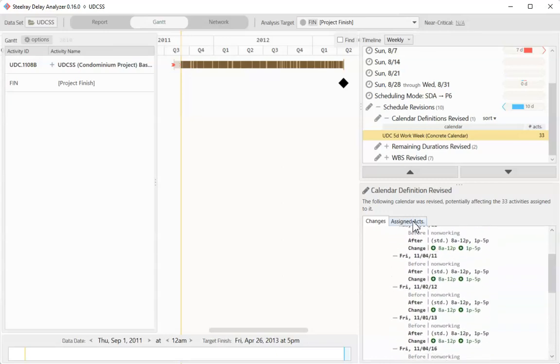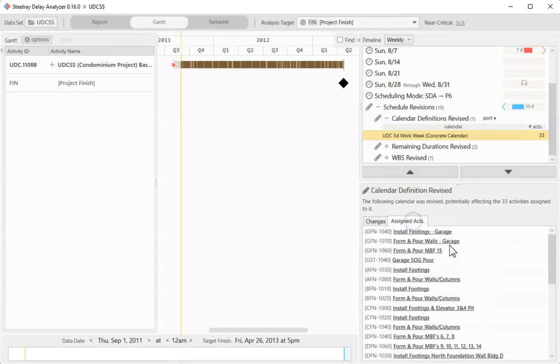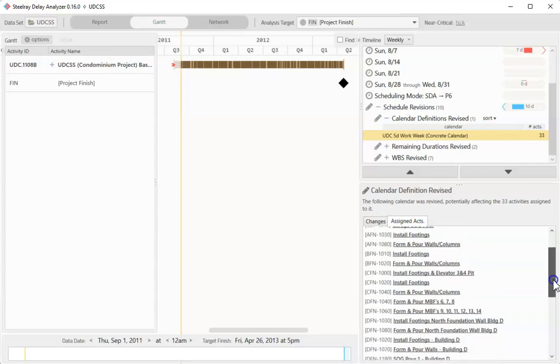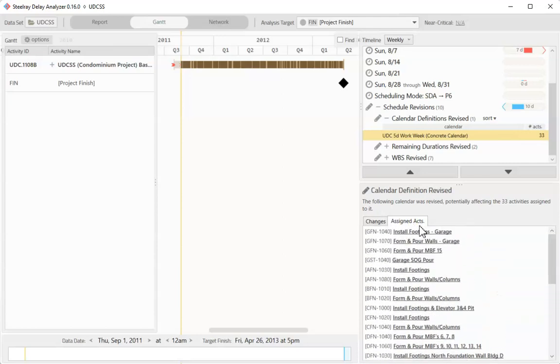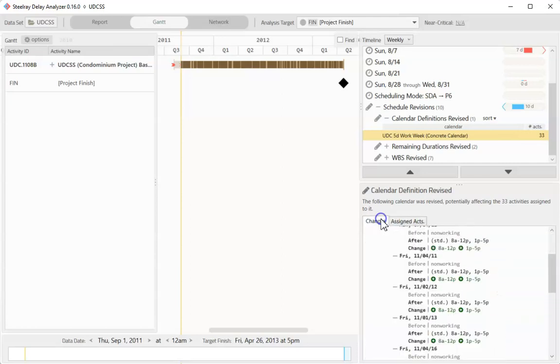Since we don't know the exact order of all of the revisions, we can't say mathematically that these caused the 10 days, but because the other revisions were so minimal, it seems very likely.